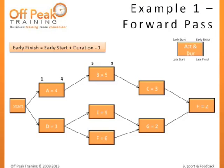Since Task C depends on B, it cannot start until after B's early finish, or the beginning of the tenth day. Using our formula, 10 plus 3 minus 1, the early finish is 12. The next node on this path is Task H. Since H has two predecessors, we will wait to calculate its early start until both paths have been completed.